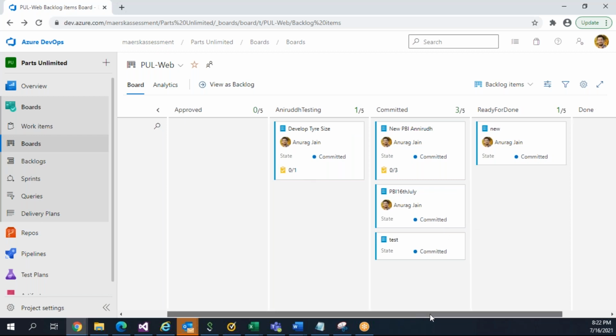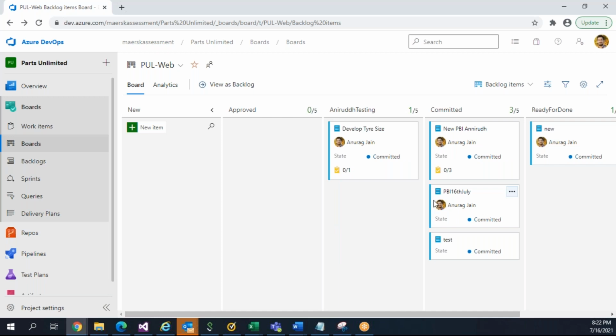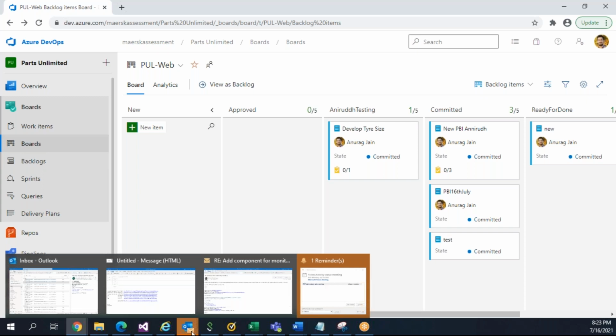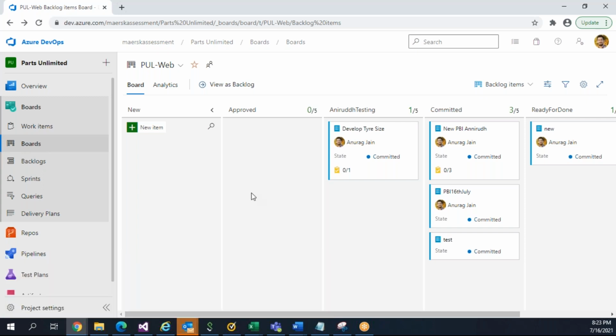So when we are moving one work item to a particular sprint, what do we call these columns? These are the columns only. When we are managing any board, we can have dependency. In any software development there are multiple phases, but by default the system gives only new, approved, committed, and done. In an actual scenario, a work item like a new feature might be in the designing phase, with designers designing, or it might be under testing by the QA team.